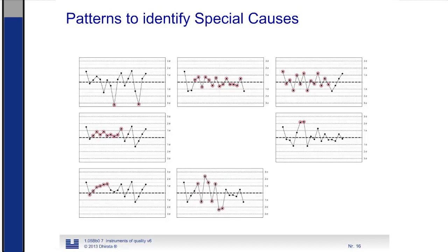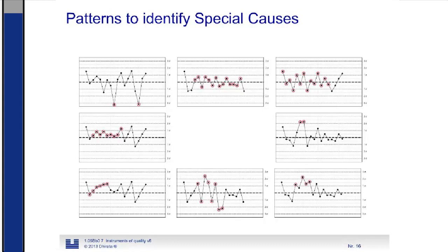If you look at the 7th chart, you will see that there is a whole series of measurements always beyond a standard deviation above or below the average. This quantity makes it very suspect and so very unlikely. At last, we see a set that successively is more than a standard deviation from the average. Unlikely, and therefore also gives an indication that there might be something wrong. What does the control chart do? It gives us statistically an indication that there might be a problem.